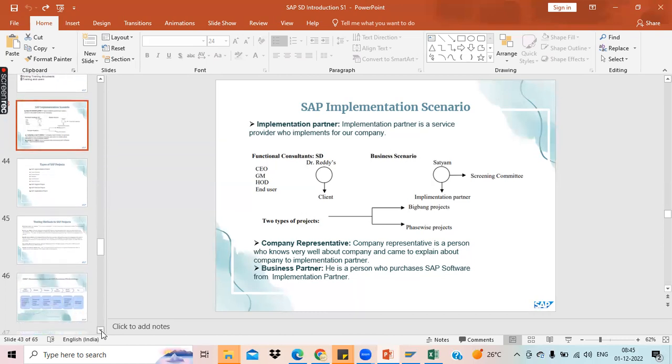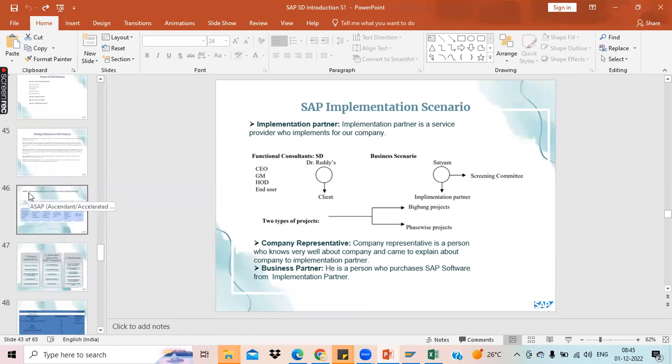The first phase will be the project preparation phase, wherein there will be functional experts from the Walmart side as well as the Wipro side. Both these functional experts will meet and discuss the business processes. The Walmart people will explain their business processes, and we will have to map them. In this phase, we will also have the kickoff meeting, where we will discuss financials, the architecture, project landscape, and also the budget and timing of the project.